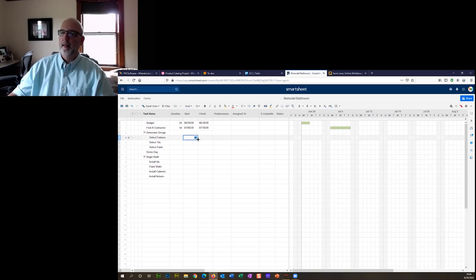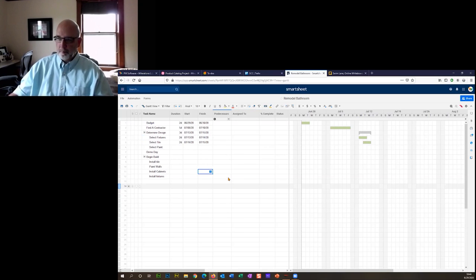So now I click on select fixtures. Now I have that option for a date, and that's going to roll up to that one. So we're going to start on the 13th and do the select fixtures. And we're going to take 2 days for that. Then on the 14th, take a couple days for that. So you can see now that this is building out the Gantt chart, which is commonly used in project planning.